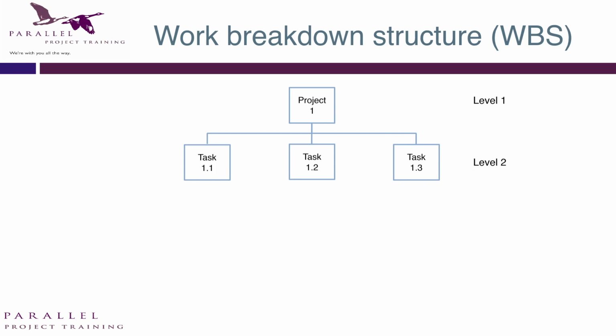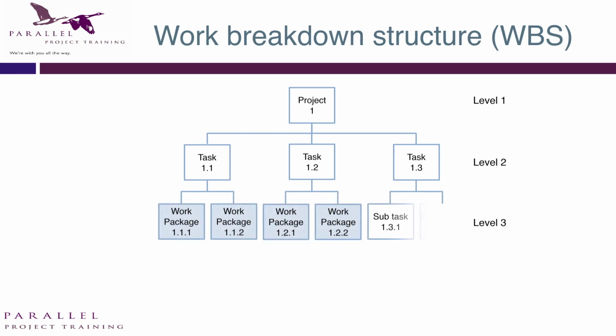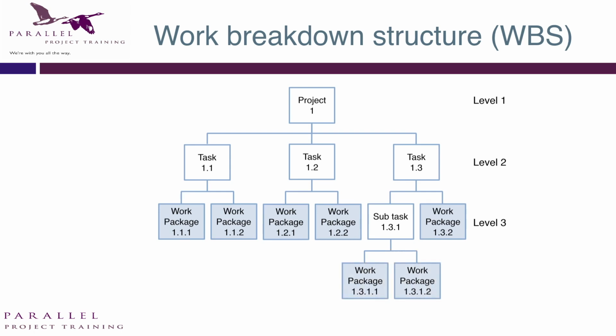And that work might be broken down into different work packages done by different organisations. So the design might be done by an architect, the construction might be done by a construction project manager, the consultation with the teachers might be done by the client side project manager. So one product might have multiple work packages. So a work breakdown structure describes the way in which we're going to deliver the products. In fact, we may split the work into different phases, conceptual design, site clearance, construction, commissioning, and the science block will feature in each of those phases.